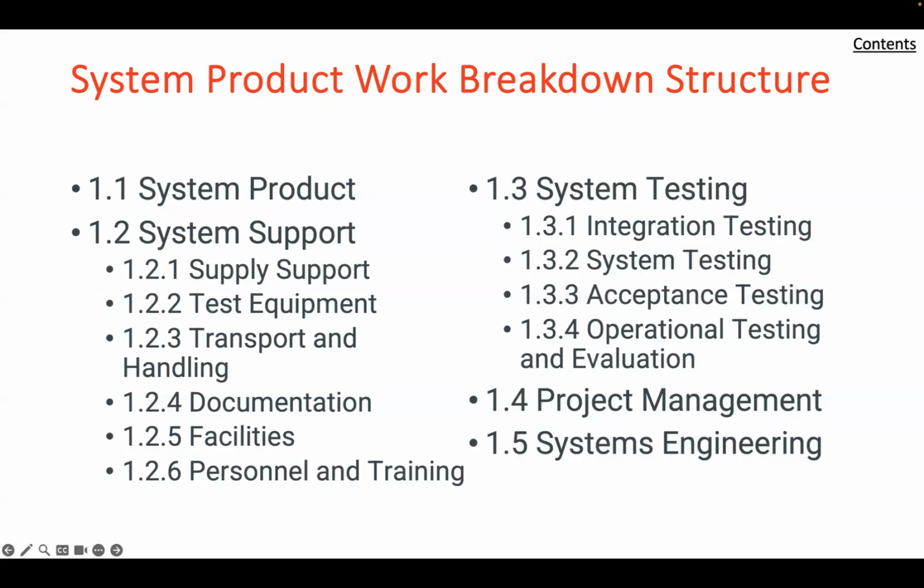Early in the budget planning process, the program manager should conduct an affordability assessment to demonstrate that the project's projected funds and manpower requirements are realistic and achievable. The activity would examine all physical demands from acquisition, development, testing, sustainment, and management, comparing the projected costs with the total budget. This is best conducted on a yearly basis, noting the funding availability, inflation, and development risk. Key participants at all levels should be engaged to ensure the best expertise and prior experience is included.